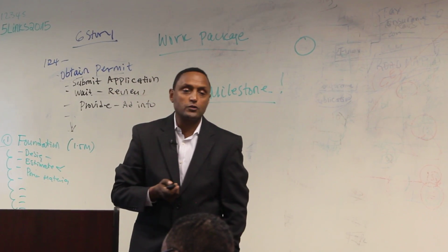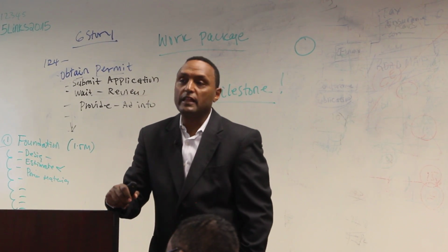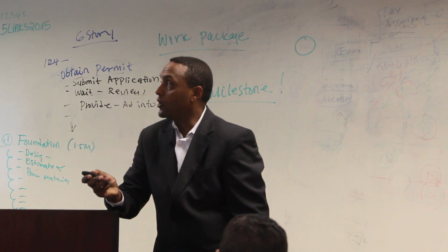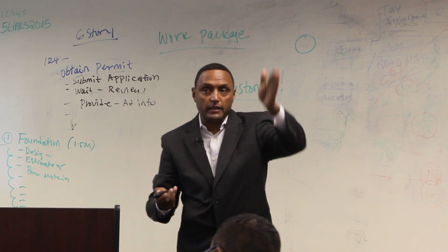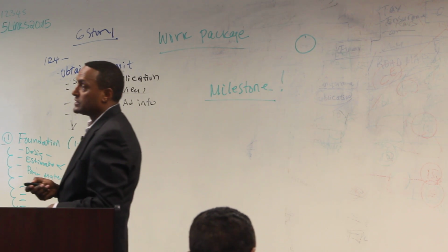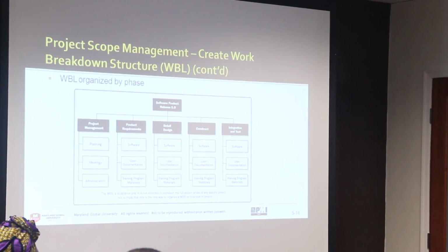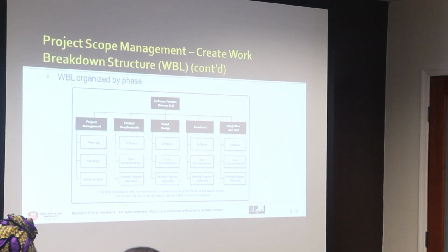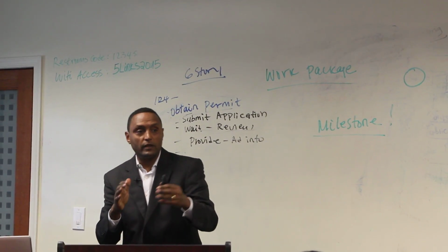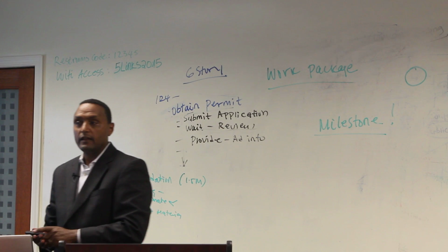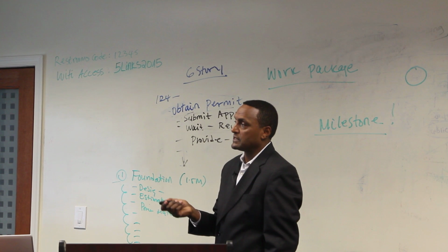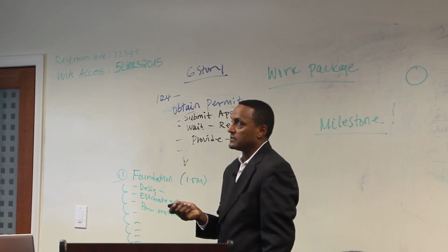Sometimes people also relate the work breakdown structure by organization and/or by phase. Like the design phase and then the other phases. So when you see here in the project management, project requirement, the detailed design, the construction, integration, and then build up. However you want to do it is probably your business, but the point here is to try to know exactly the lowest point in that area. This is by organizational deliverables. This is another version of work breakdown structure.